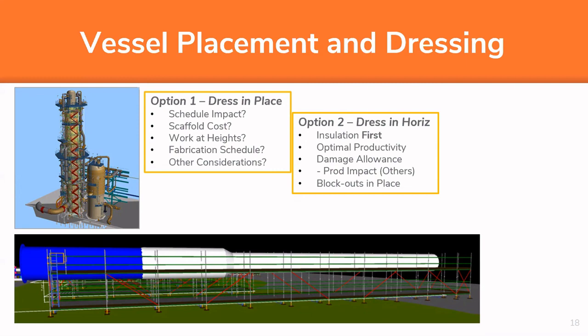We have optimal productivity, which is good for me, but we also recognize that we're going to most likely have some mechanical damage when they start hanging all of the landings and all the pipe, all the instrumentation, everything that's going to subsequently follow our activities. We're going to have to allow for that, which we're currently doing, and we'll put a budget against the repair work, and then we'll do a composite drive out cost with all of the other crafts engaged in that process.